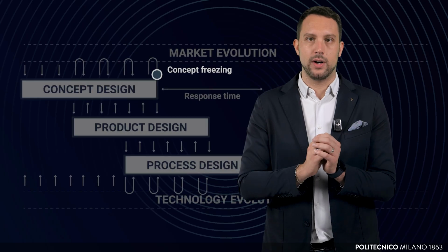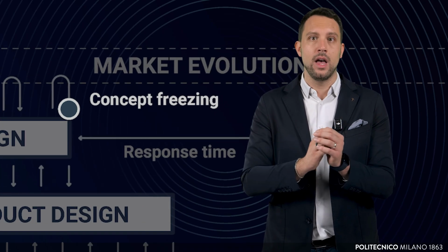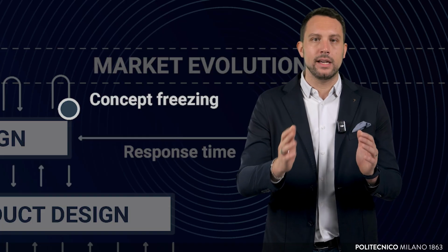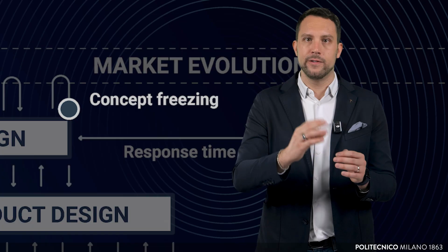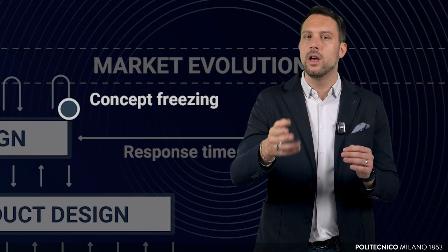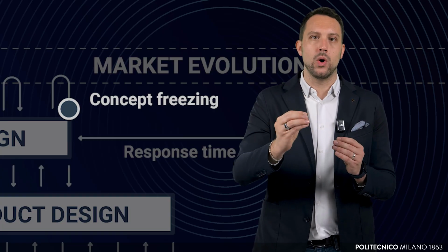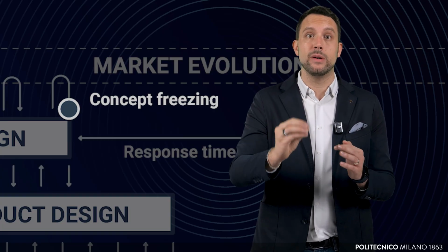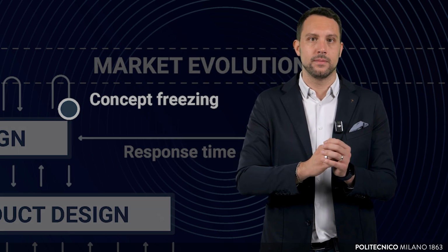The rigid nature of this approach requires freezing the scope at this stage. While this provides clarity, it also introduces risks. If requirements change, for instance, if stakeholders later request interactive quizzes or AI-powered recommendations, revisiting the scope may necessitate extensive rework, disrupting the timeline and inflating cost.